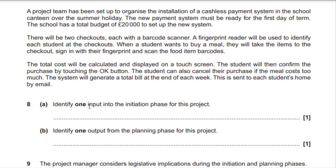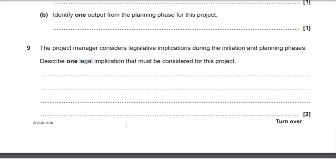Acceptable answers for 8a include: user, school, or client requirements; the school's constraints or boundaries; the business case; or resources (with examples). Question 8b: identify one output from the planning phase for this project. Think about outputs you know come from the planning phase and relate them to this project. Acceptable answers: project plan, test plan, constraints list, or phase review. The outputs of the planning phase remain the same no matter what the project is.